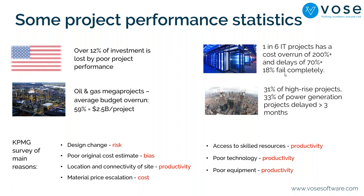Oil and gas mega-projects average a budget overrun of 59%. KPMG did a survey looking at the main reasons for project failure — the ability to meet the deadline, stay within budget, and deliver the product. Seven key factors emerged, including design change, which is a risk event, and poor original cost estimates.